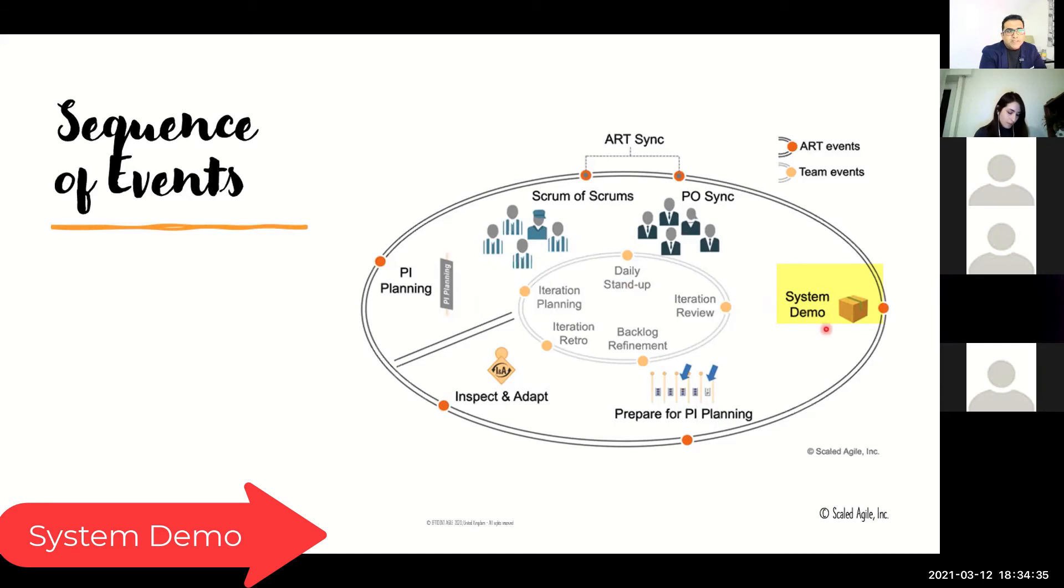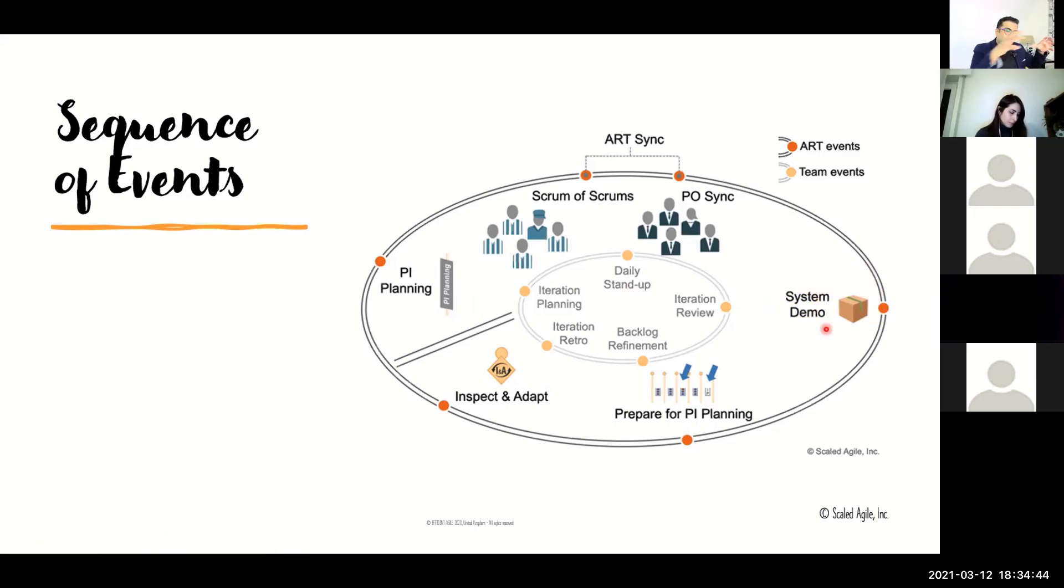There's also something called a system demo. The system demo is not your team demo, it's the integrated elements of everything. Team one, team two, team three, everybody integrates, and you have what the train has delivered in one sprint. That demo takes place after each and every iteration. That's where you get feedback from the product owners, product managers, stakeholders, and everybody gives you feedback.